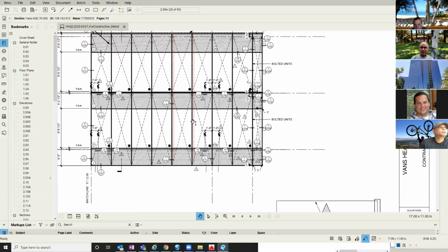If it makes more sense, then we could put that in as a checklist item all the way up to family planning. The reason it's important to do it there is that you don't want this to go through the drafting process, come to the 80% review, and then have someone say, oh, let's make a new family here. Because at that point, the drafting team is going to be limited on their time and resources to be able to develop that second detail.